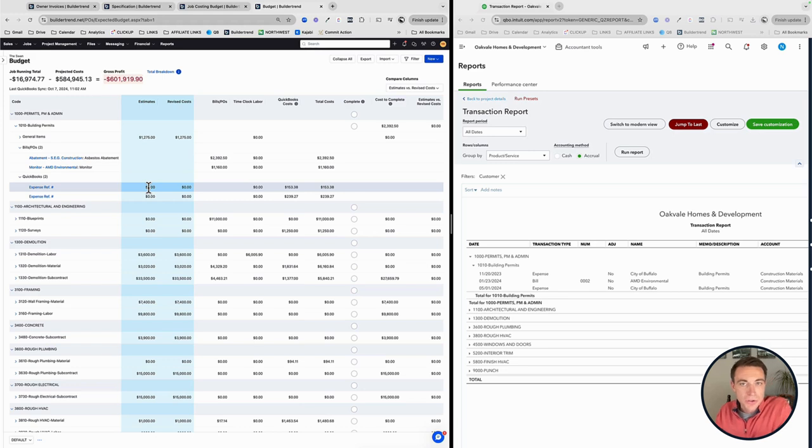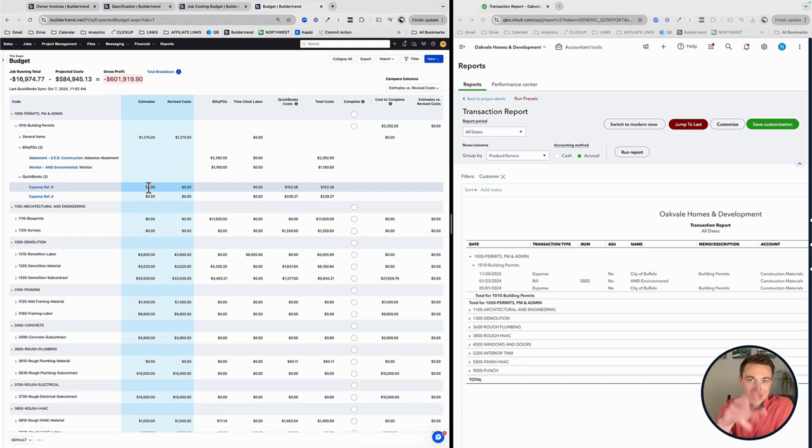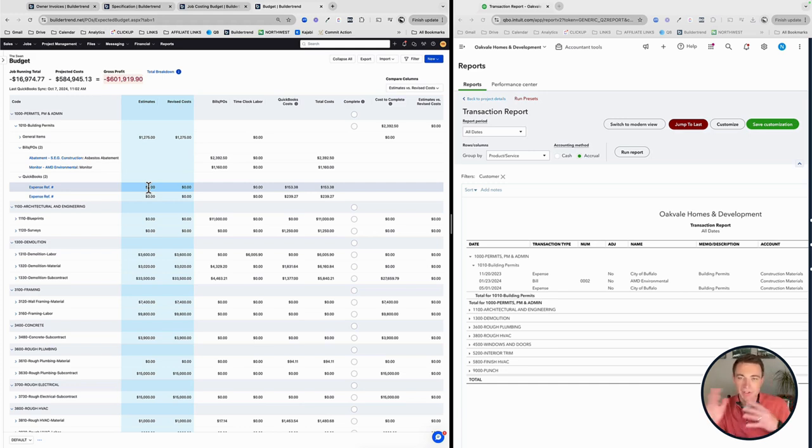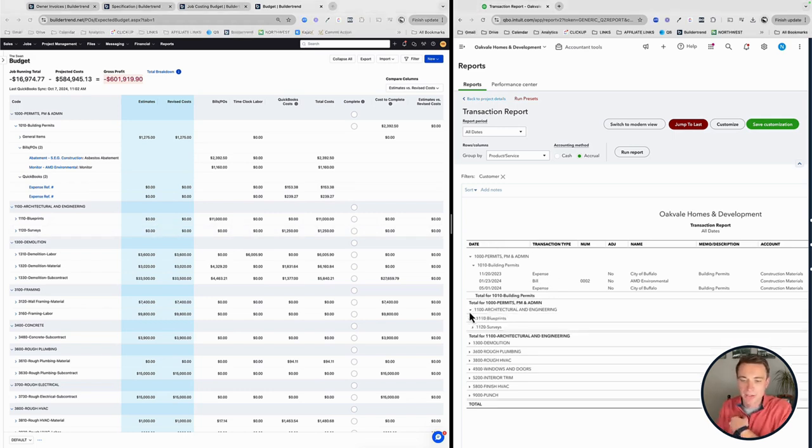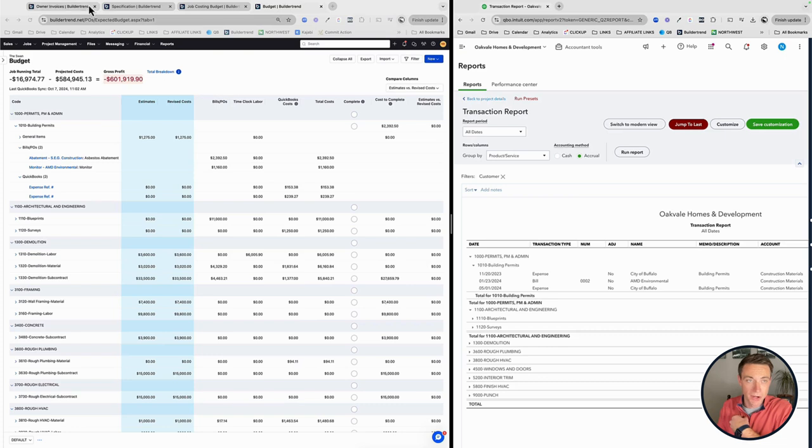The link is really, really strong and that's what we want to be in there. There's two different situations where we want to track expenses. One is within BuilderTrend itself. Bills can be tied to the schedule. So powerful as a schedule moves in or out, your due date on your bills move, but we have those day-to-day transactions. Those are going to be tracked within QuickBooks and brought over.